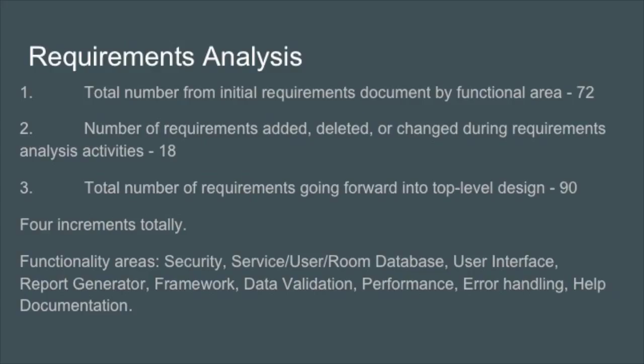The requirements were broken down from the original document provided by the customer. We started with 72 initial requirements, and after clarifications and additional discussions with the customer, a total of 18 requirements were added. This left us with a total of 90 top-level design requirements. Due to the Agile method used for developing the project, some of the requirements will change or be added to. More specifically, to elaborate, and split some of the requirements in order to make them more specific and testable. To see more information, see the attached appendix for full descriptions.